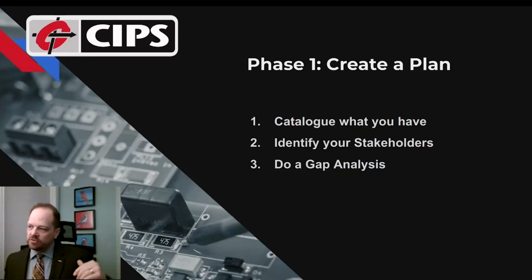I break down my plans into 3 steps. First step is I create a series of catalogs. So I usually do a data catalog, a reporting catalog, an entity diagram, and then I also throw in other documentation such as the stakeholder address book, identifying who in the organization is the specific data owner tied directly to the data that's coming through in your reporting system. Create all that documentation, map it all out, and then when you're going forward, you know exactly who to talk to and when to talk to them.